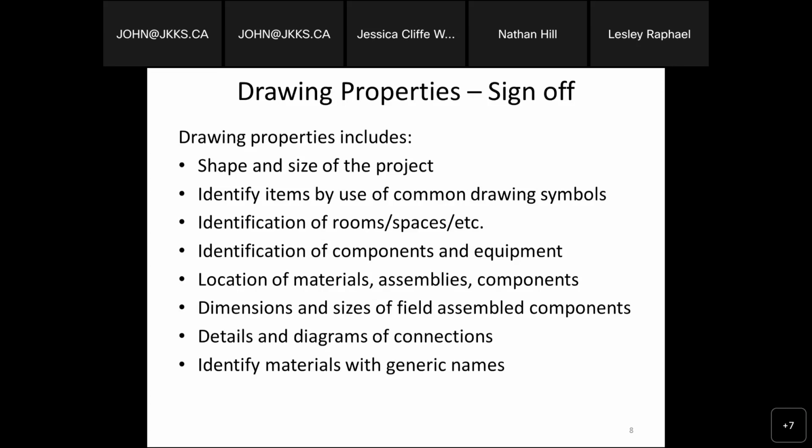Another thing we used to use in the architectural engineering field is that each drawing in release would be dated. So there's a trail of dates when drawings and documents would be submitted, up to the final stage where we see the engineer or the architect stamp on the drawings, ready to bid on and to be released for construction. Well, there's a lot of things that the architect and engineer must look at.